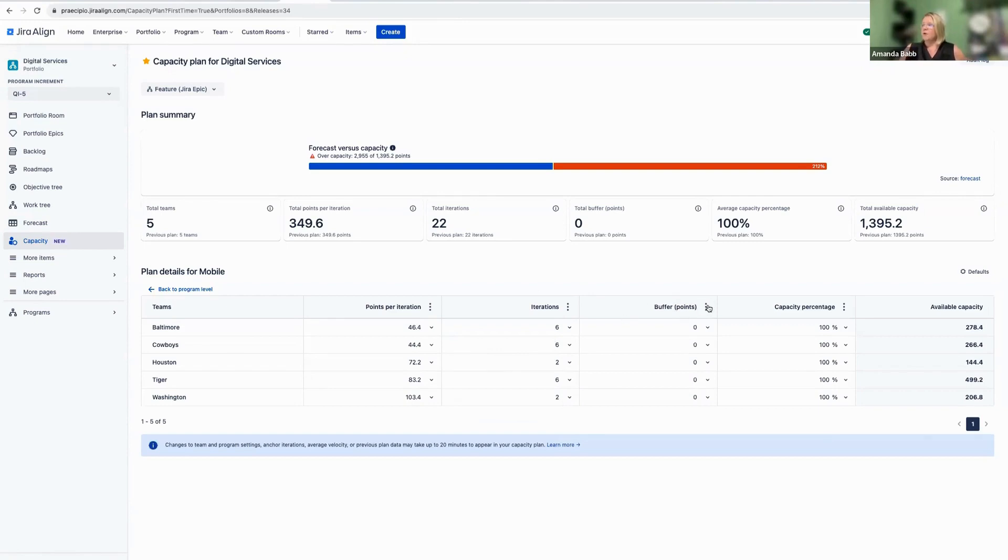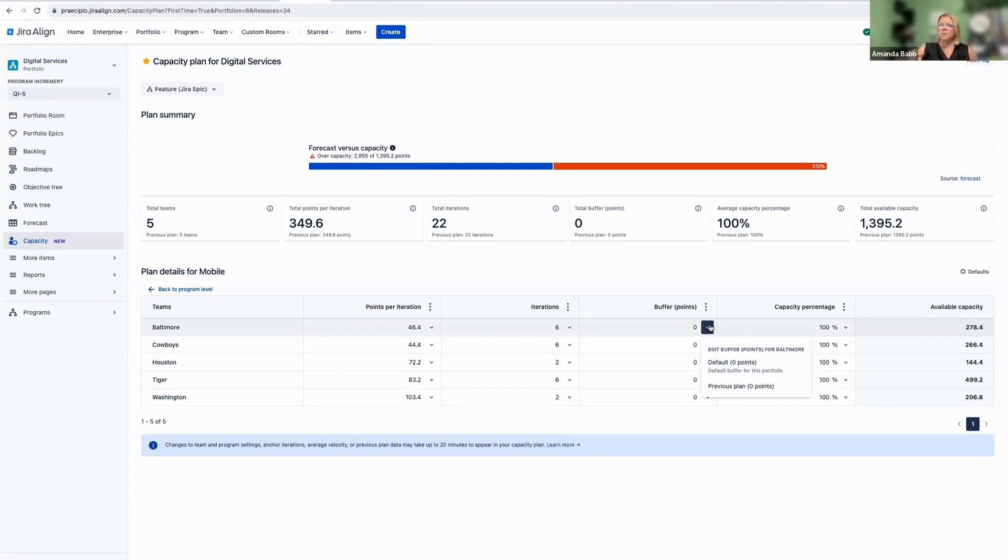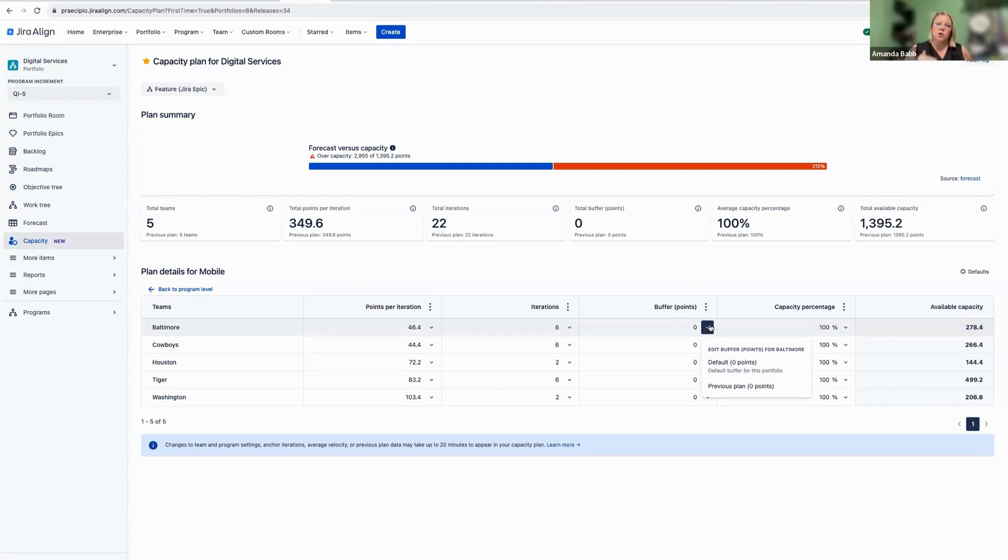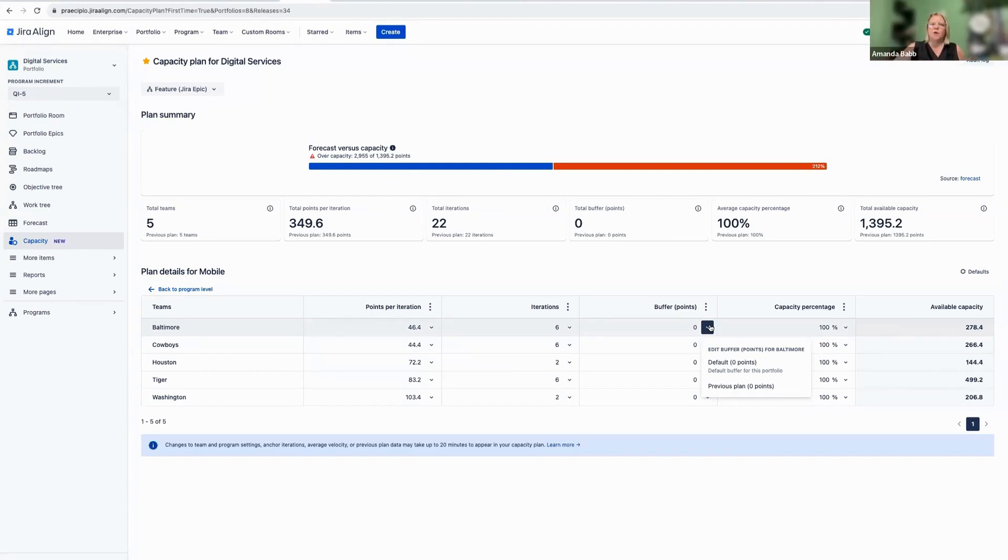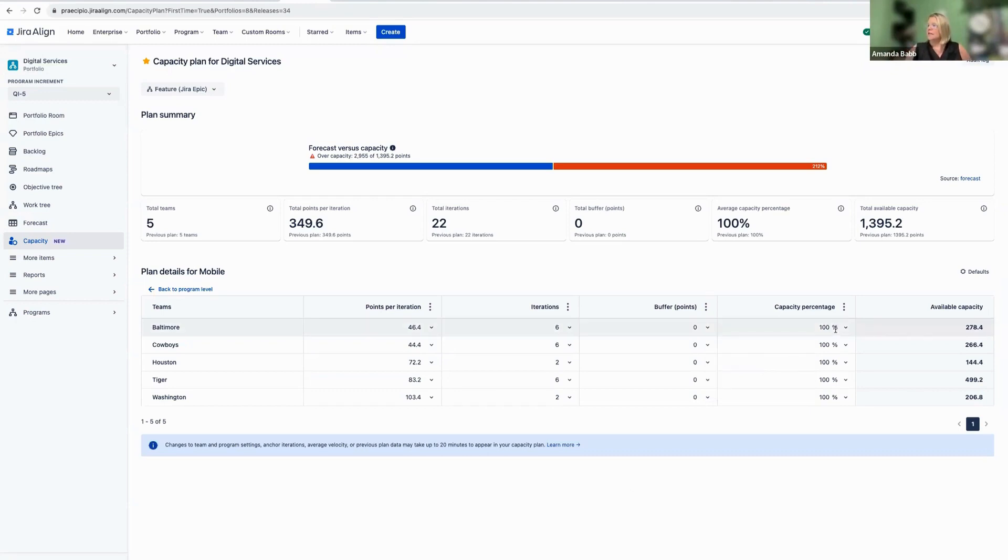Buffer points is kind of an exciting thing here. So this is basically going to give us an opportunity to say whether or not we have some folks that may not be available during this sprint. So we're saying, hey, instead of maybe all of the points, we may need to load to a lower set of points as opposed to 100%.